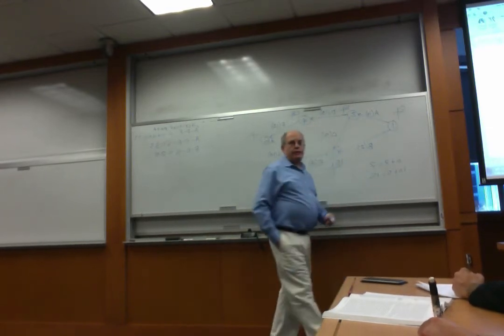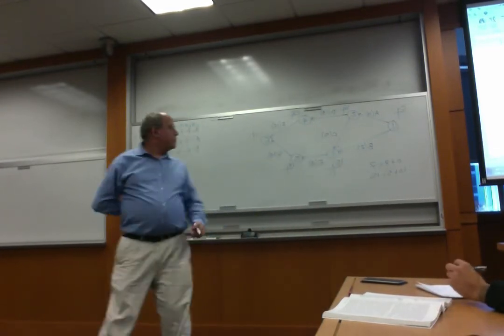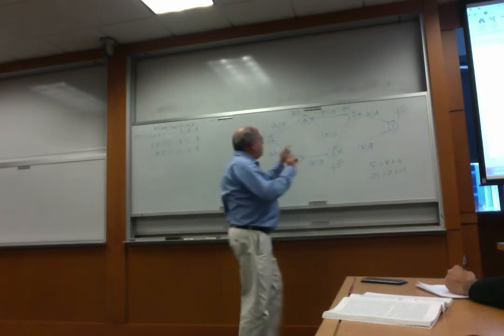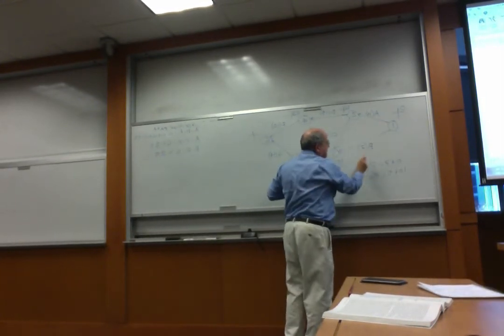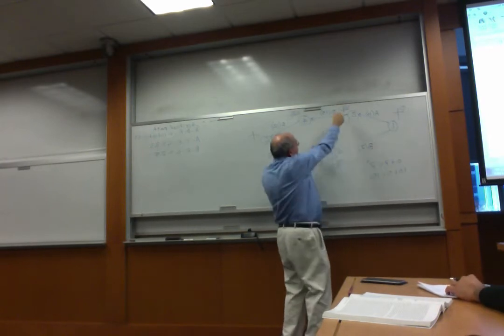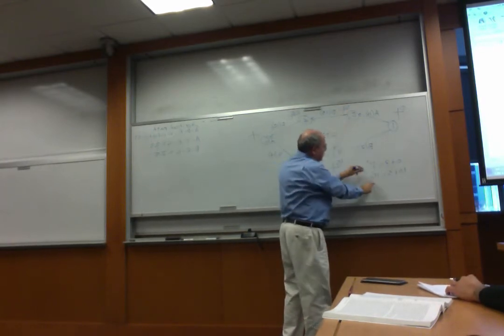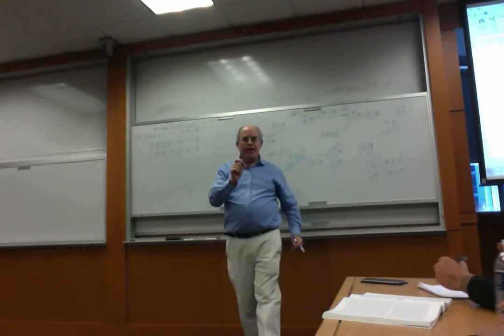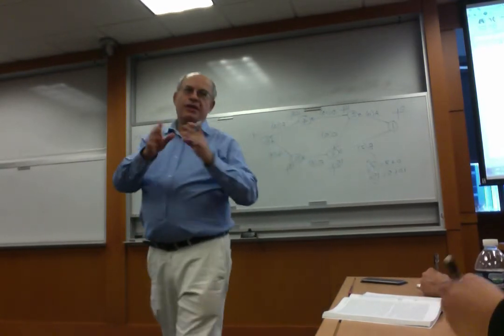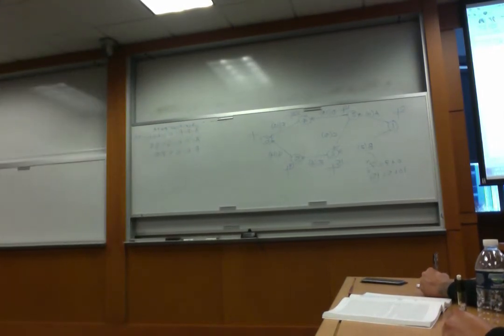I have a question. From 1 to 3, it's 7. Oh, there are 2 ways to get there. So I said from 1 to 3, one way is 0 plus 7, but there is another one, 10 plus 5, 15. And I said when there is more than one way to get to a certain point, it's the longest. Because we're looking for the longest path, we choose the longest. Now, at 4 and 5, there were no comparisons. There was just one way to get here.